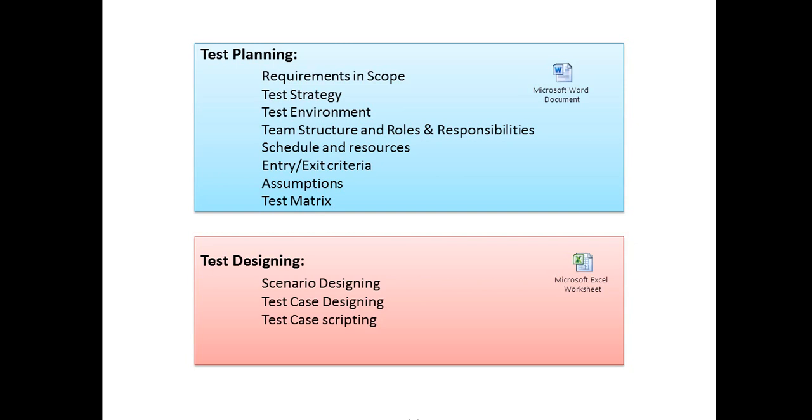Next is team structure, roles and responsibilities. There will be a chart for the team structure clearly defining what role is assigned to whom. Schedule and resources will include a timeline of all the phases in STLC.